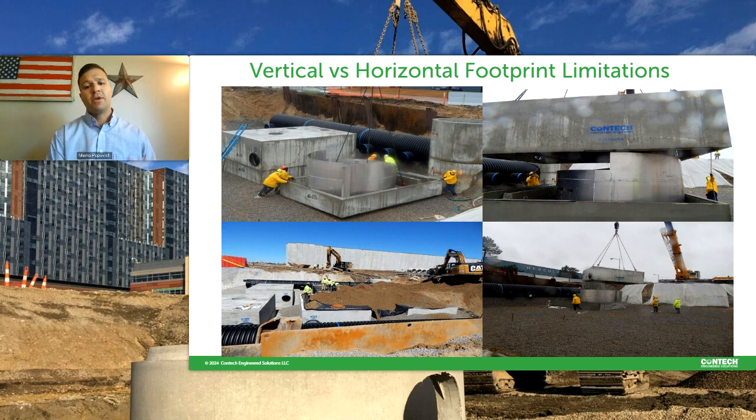We'll be out there to provide on-site support with a pre-construction meeting to ensure this is going in the way that the engineer who stamped the submittal drawing, that was approved, this is how it was built. But so then when that site is actually active and seeing stormwater coming through it, it's properly functioning and the stormwater is going through, we're getting good treatment, and we're good to go.